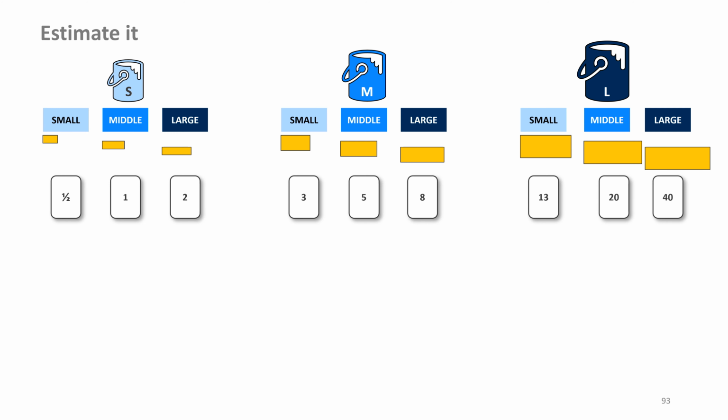Here we have an approximated Fibonacci sequence. In Fibonacci, the following number is the addition of the previous two. So 1 plus 2 is 3. 2 plus 3 is 5. 5 plus 8 is 13. Actually, 21 should be written here instead of 20. From here on, it is only approximate, and the higher the number, the more vague our estimates.